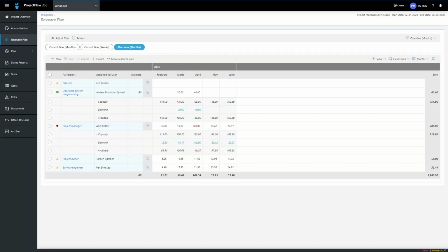When you allocate hours on the annual, monthly, or weekly basis, the hours are always distributed and saved on a daily level for the participants' working days. If you enter 100 hours per month in monthly view for a month with 20 working days, it will correspond to 5 hours per day, unless the participant has vacation days in the month or there are public holidays in the month.